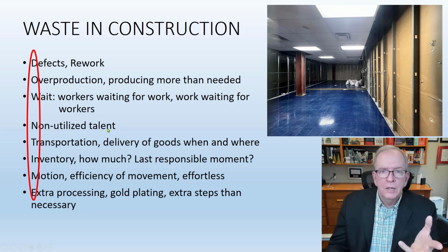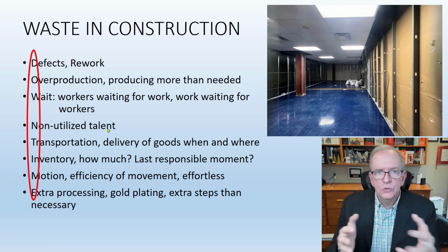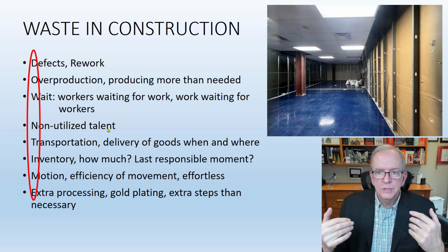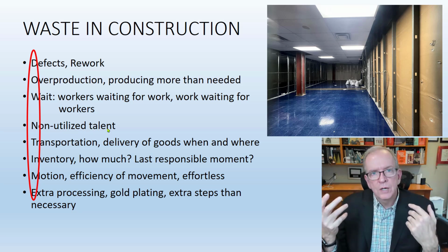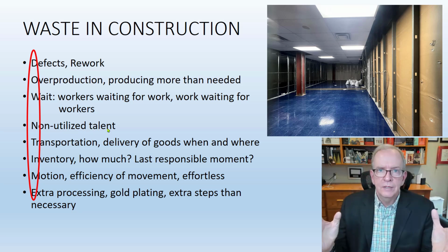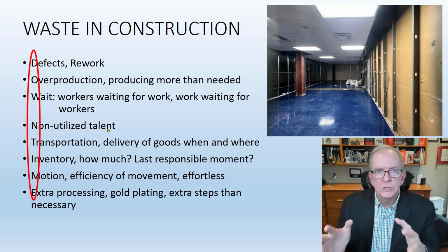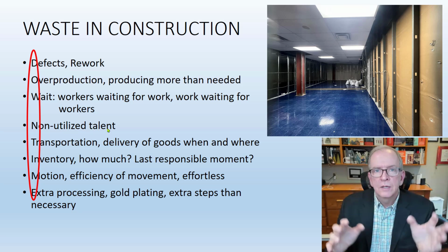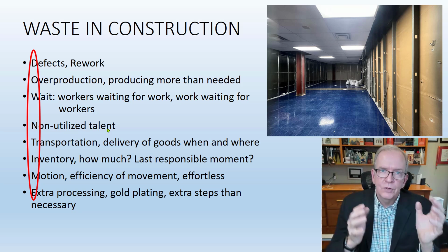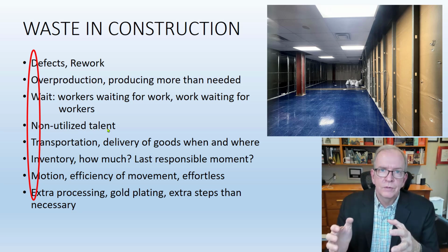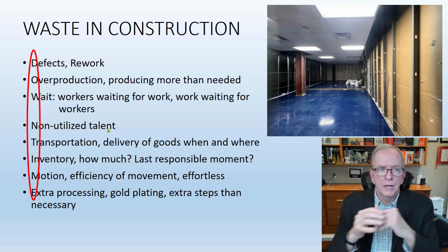If you didn't really check with the GC and the other trades, because this is what happens sometimes on projects. A trade gets a whole pile of stuff delivered and the GC didn't fully comprehend the size of it. Of course, a lot of GCs do, but if you didn't, you got this surprise and think, what are we going to do with this now? And that's very often a trade optimizing for themselves, not the overall project.